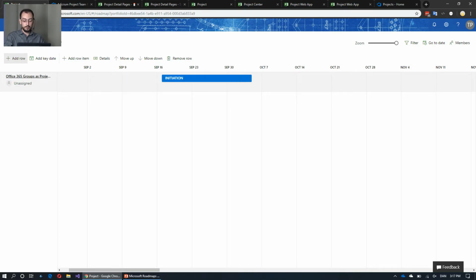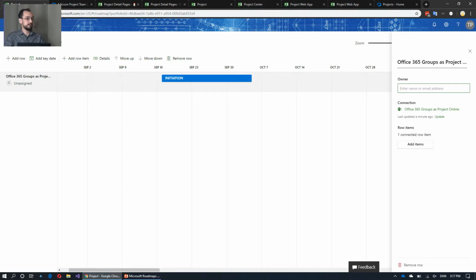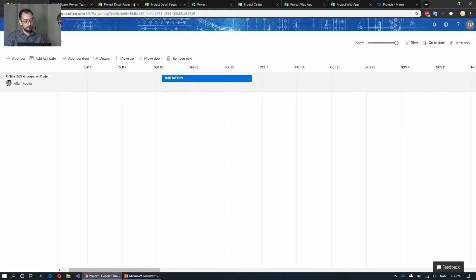One thing that I skipped over is I can assign an owner. This doesn't make any changes into project. It's just informative. So I can say, okay, the person that's responsible for providing status updates and all that doesn't have to be necessarily the project manager. It could be the sponsor, the person that's doing more follow-ups with the project manager and is responsible for presenting to the board. I'll just use Alan over here. And it showed up already for me in the roadmap, right?